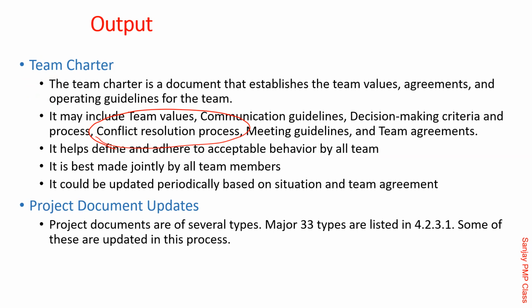Right. Now, conflict management resolution, there are certain principles by the PMI, and at least a few people-related questions, Aniruddha and everyone note, will come on this topic called conflict resolution. Whether the process should be documented in the team charter is a different matter. But the principles, understand this. And Aniruddha, good, you noticed it. The first thing in the PMI's mind, and which is true as well, is that if there is a conflict between individuals, they are the ones who should sit down across the table and resolve it.